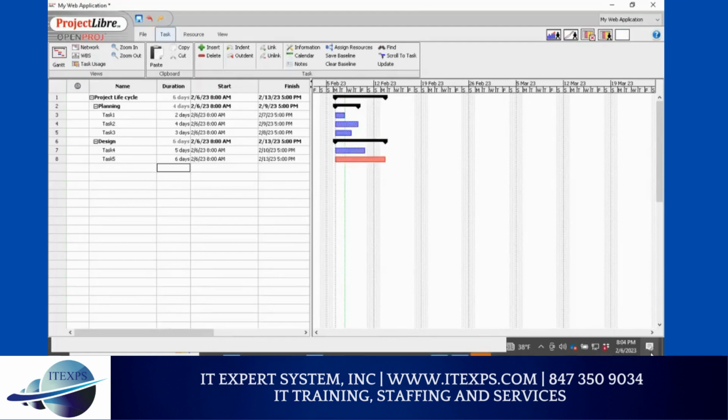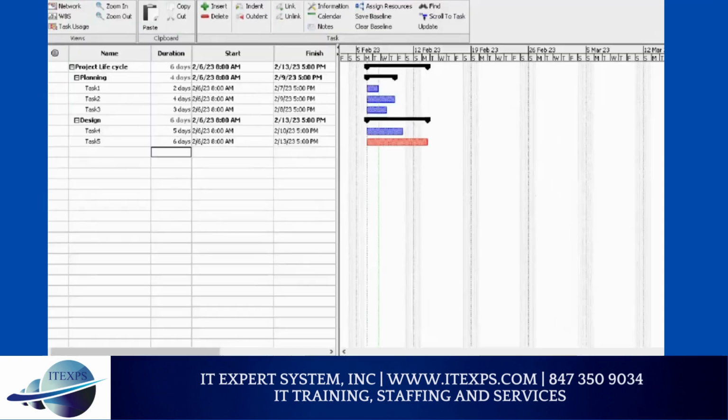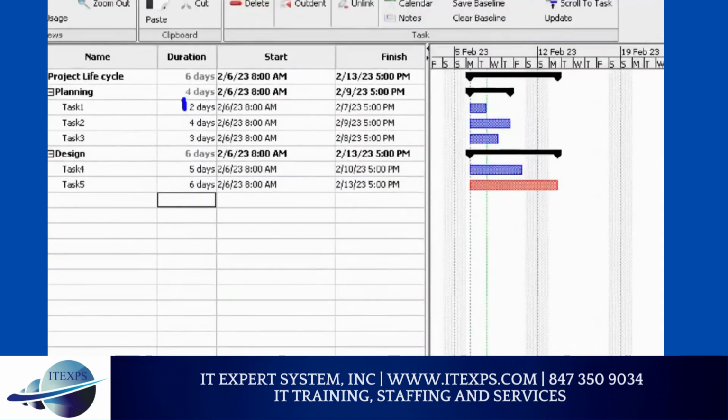You might notice that as I entered, my question mark disappeared. Did you notice that? As I entered, the summary was automatically calculated and the question mark disappeared. When the question mark disappears, it means I calculated the estimation for this activity. The summary activity finds which of the available tasks is the longest, and based on that, it calculates automatically.